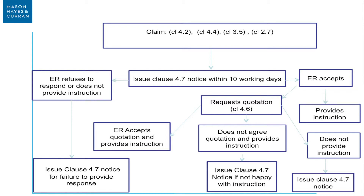Your ER will either accept the claim - in which case he provides an instruction, you get on with the job and all is fine. Alternatively, your ER may refuse to accept your claim and refuse to provide an instruction, or, which is more common, the ER will simply ignore you. The amount of times problems arise because the ER does nothing - that is a claim in itself.